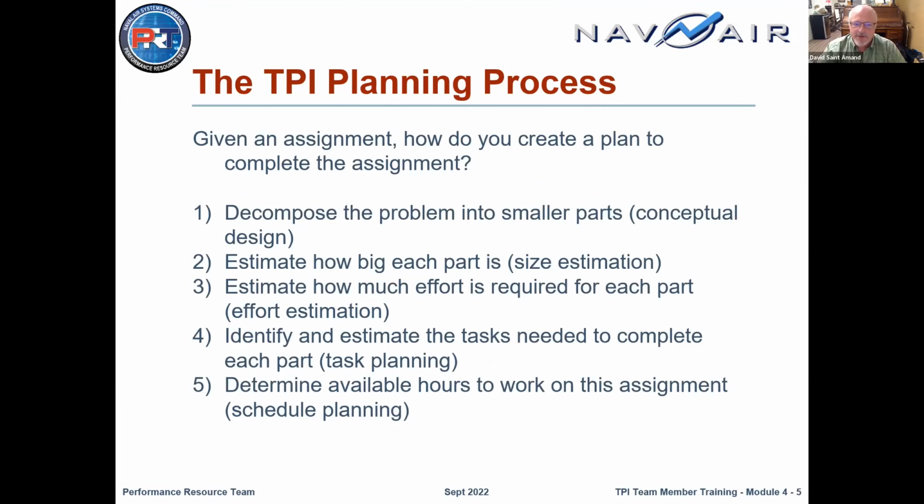So we have the process. What do we do? We've been told to get some work done. How do we make a plan? Well, you break it down into bite-sized pieces, manageable chunks. You figure out what is it I have to do? What are the big parts that I've got? I'm going to estimate then the size of those parts, and from there I can estimate how much effort, how much calendar time it's going to take.